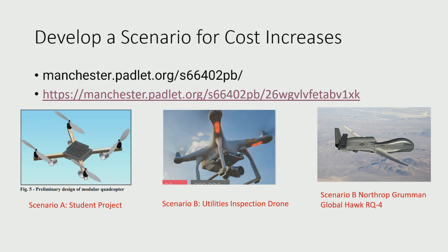That's exactly what happens. You try to be scientific about it, and you try to predict risks, but it's easier to just add on a percentage because it's uncertain anyway. But people like BAE Systems, they do break it down into risks and uncertainties and use Monte Carlo. But for unknown unknowns, things you don't know, which is a management reserve, they usually use a rule of thumb for that industry. So they use their experience to gauge that, and as well try to think of the environment, what's happening.